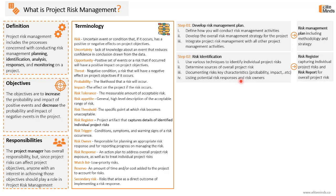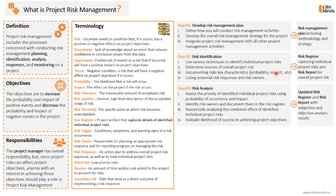Once we have the risk management plan, we identify the project risks using various techniques such as brainstorming or SWOT analysis. We determine the sources of overall project risk, document each risk's key characteristics, and at minimum determine the probability and impact for each risk. We also list potential risk responses and risk owners. The outcomes of this step are two important project artifacts: the risk register, capturing all individual project risks, and the risk report for the overall project risk.